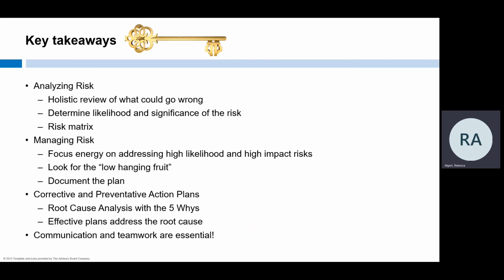Corrective and preventative action plans are here to help us manage risks that occur. They act as a mini risk management plan focused on addressing the specific issue at hand. The team needs to work together to conduct a thorough root cause analysis using the 5 whys method. The plan should address the root cause. Communication and teamwork throughout these processes is essential for the best result.